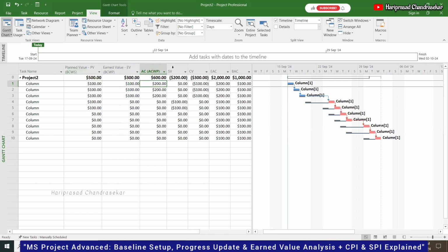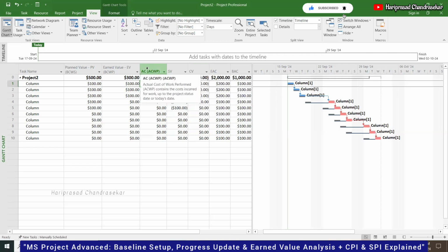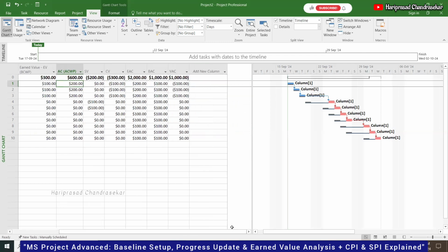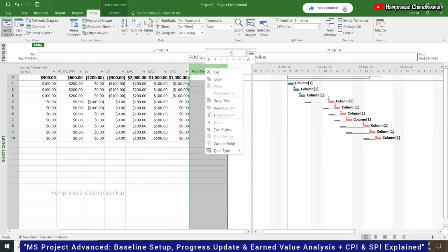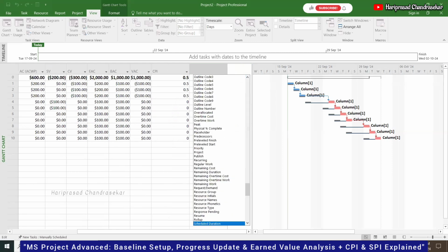And you might be having some formula to calculate it. So you can see the formula here. SV equal to BCWP minus BCWS, CV equal to BCWP minus ACWP. So all this you have here. So no need to worry, all these are simple formulas, it will come automatically. Now you got everything, but now how can you study whether it is going as per the cost and time? Now we can go for CPI, SPI. This is very important for any project.